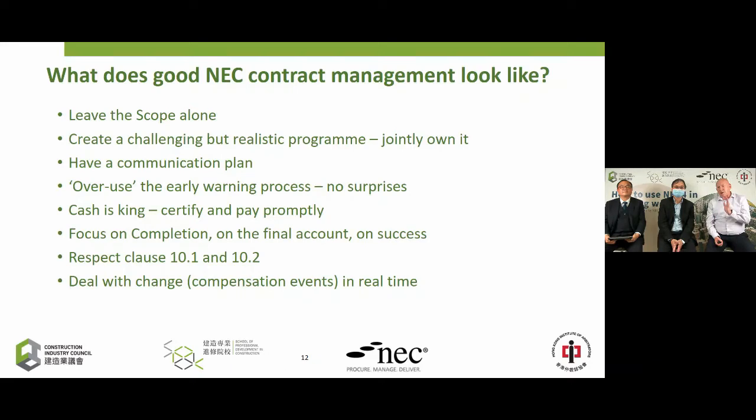Can I find this report? Keep trying. I read a report about some of the governments of Canada some years ago that found that when you introduce change after the contract was awarded, it cost 3 times what it would have cost had it been the original scope. Change is expensive, it disrupts. Do not do it unless it's absolute necessity.